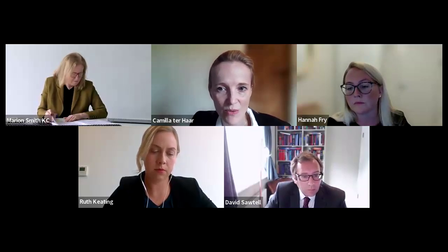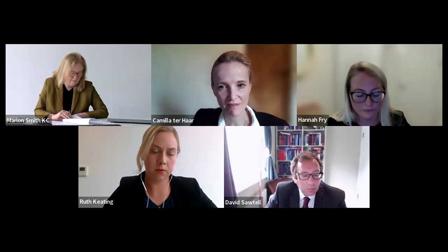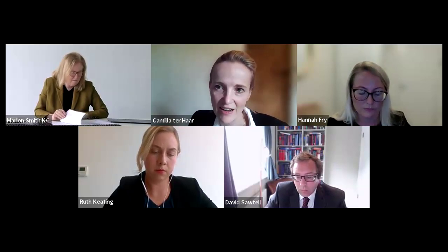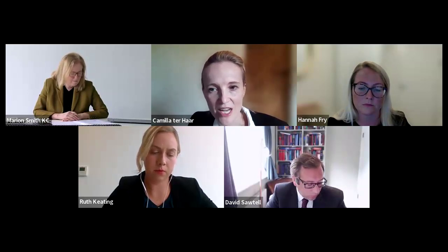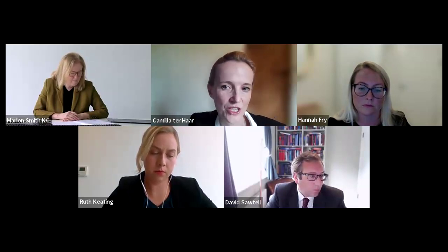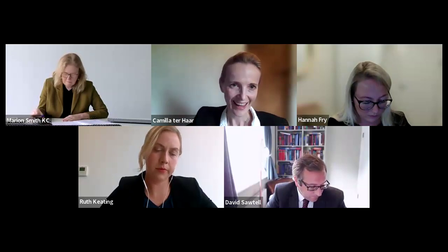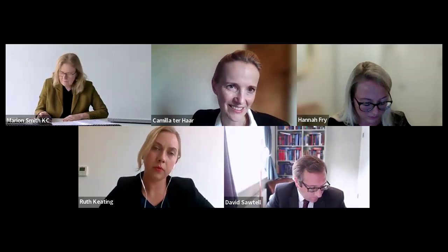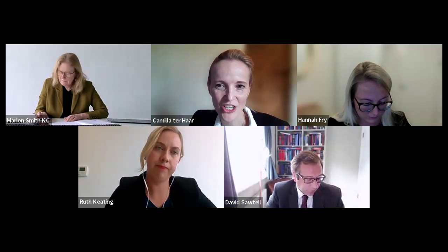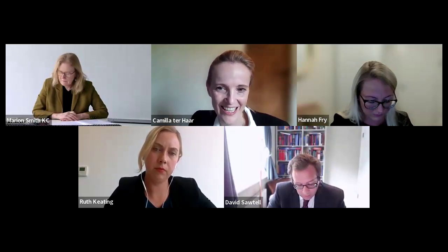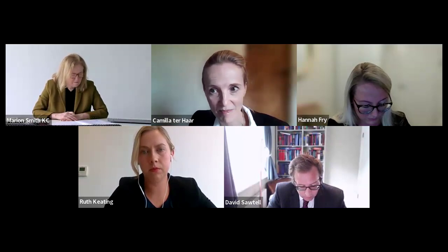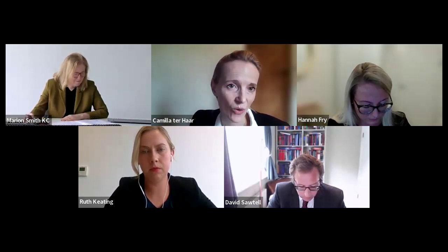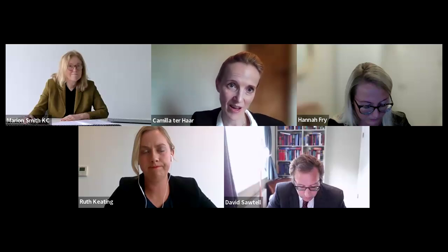So parties may wish to consider revising the clause to provide more clarity that a contractor will also take on all design responsibility for any changes instructed as a result of the suggested amendments. Now, this clause is interesting because the contractor is encouraged to suggest the economically viable amendments, but not required. So this clause doesn't contain a carrot or a stick to encourage compliance.